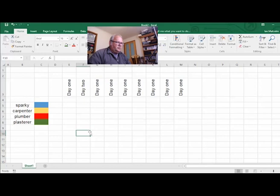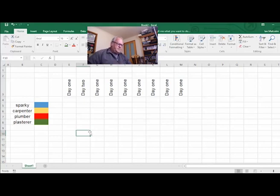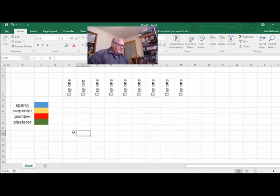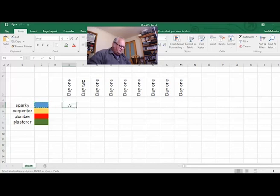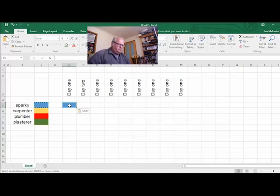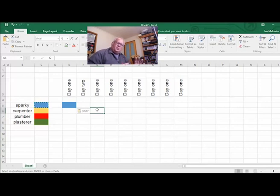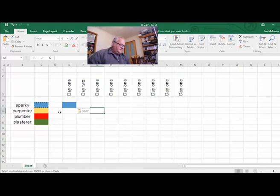Now let's think about who goes first. I'd have the sparky there to disconnect all the electrical and make it safe before anyone else comes, so on Day One he's coming. I'm not going to have someone there at the same time — that's one of the good things about Gantt charts: you don't have your trades on top of each other. Next, the plumber is coming Day Two for two days to disconnect everything and make it safe.